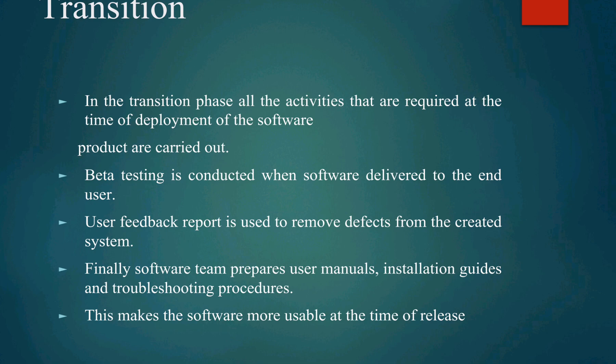These are the four important phases of the Unified Process Model. Inception phase: approximate vision, business case, project scope, and vague estimates are defined. Elaboration phase: refined vision, core architecture, resolution of high risk, and realistic estimates are defined. Construction: source code is developed. Transition: the product is moved to the customer, beta testing is carried out, defects are removed based on user feedback, and finally the user manual is prepared and delivered.